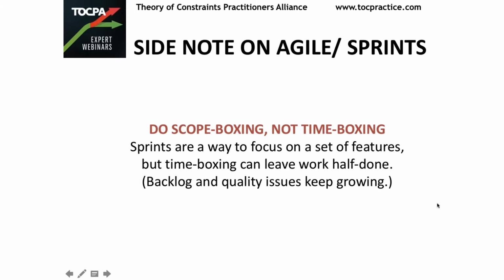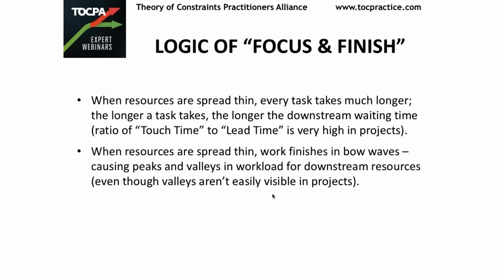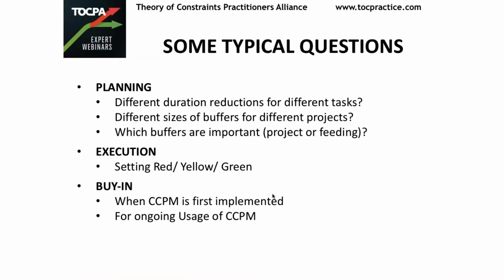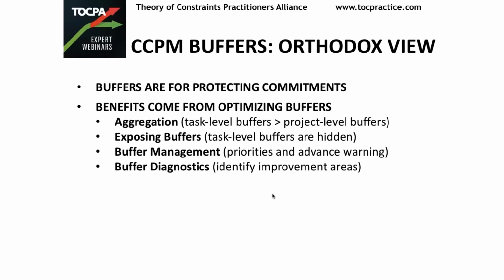How can the throughput go up when you take the buffer? It was coming back to the previous discussion about the buffers. So that is, Edmund, a different topic of discussion, right? But I'll give you a one-sentence reply, but you might want to watch my TOC ICO presentation from 3 years ago. The main point is simple: if you have variability and uncertainties in an environment, and you don't have buffers, then you end up creating interactive constraints. And when you have interactive constraints, your throughput goes down. So it looks like buffers are taking away from available capacity. In fact, they're adding to available capacity by reducing the interactive constraints.